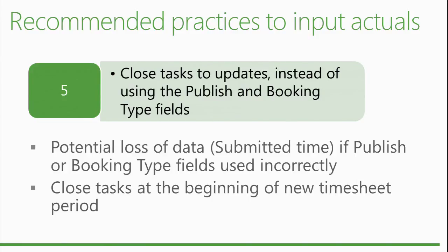All right. So the last thing is to close the task to update. We have a new feature also in 2010 that allows you to basically lock down tasks so that you close them so you are sure that no one is going to input any time in them. Because that has happened in the past, right? Where you didn't have a very good way to really block updates to tasks that were still showing up in the timesheet, that were not complete and everything. So now you can actually close a specific task. There is an option to do that, to update, and then that will prevent users from altering or inputting any updates on these tasks that are closed.